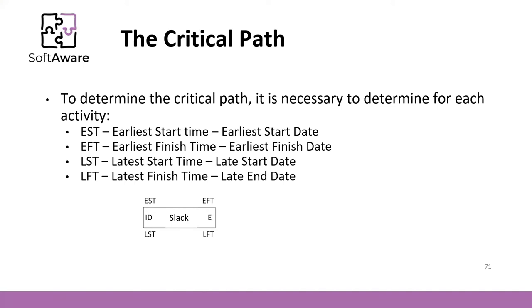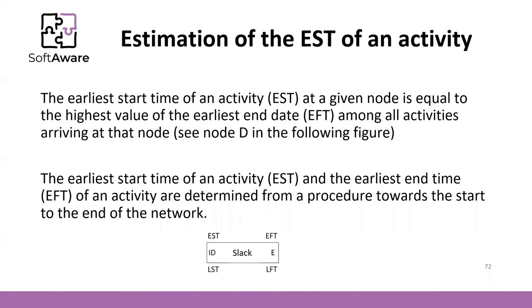Let's see how we can reach these times and the critical path. To determine the earliest start time and the earliest finish time, we start by calculating the earliest start time of an activity, which is equal to the highest value of the earliest end date among all activities arriving at that node, as we will see in the next picture with node D. The earliest start time and earliest end time are determined from a start-to-end procedure through the network. We can calculate the earliest finish time as: earliest start time plus duration, minus one unit.